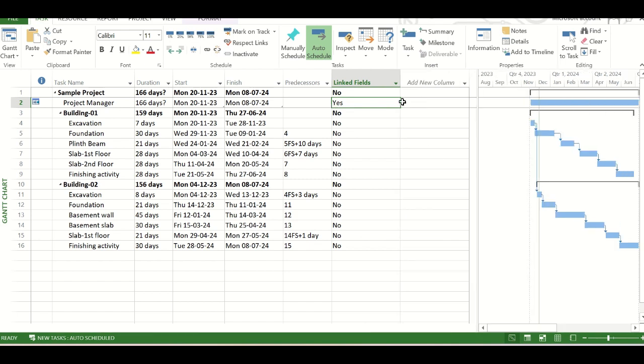Now what is the utility of this hammock task? We can assign the resources with this task that are required for the entire duration of the project or for any particular building. See, this hammock task can be used for any particular building also.